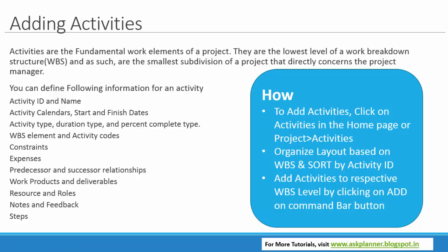Now we have seen how to create the WBS. Now let's break this WBS into individual work elements, that is activities. These activities are nothing but workable and measurable activities. To list down these activities, we go to the expertise of the individual WBS owners and consult with them and design this activity list. The more minutely you divide the WBS into activities, the more detailed the schedule is. So people call it the L1 schedule, L2 schedule, L3 schedule. These are nothing but levels of breaking down to the ground level.